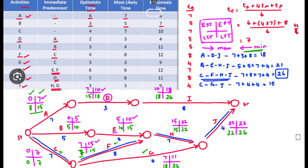If the early start time is 0 and early completion time is 7, and the activity starts after an 8-day delay, there is no effect on project duration. LST is the maximum duration we can delay starting the activity, and LFT is the maximum duration we can delay finishing it. In the critical path there is no delay and no float, because any problem on the critical path affects the entire project duration. We must pay very close attention to the critical path, where the degree of uncertainty must be kept very minimum.